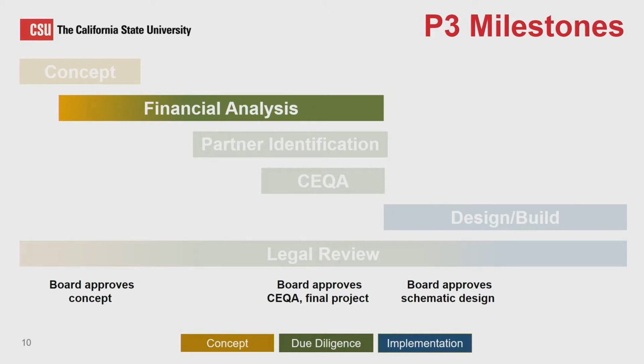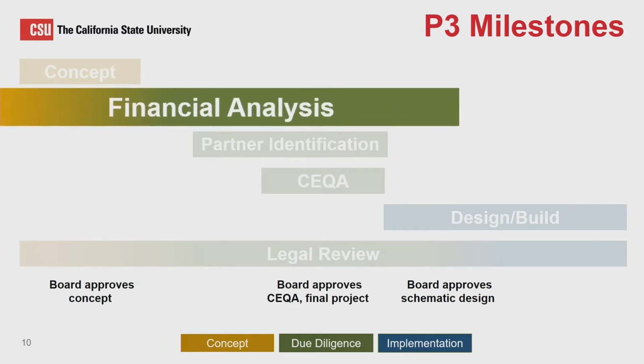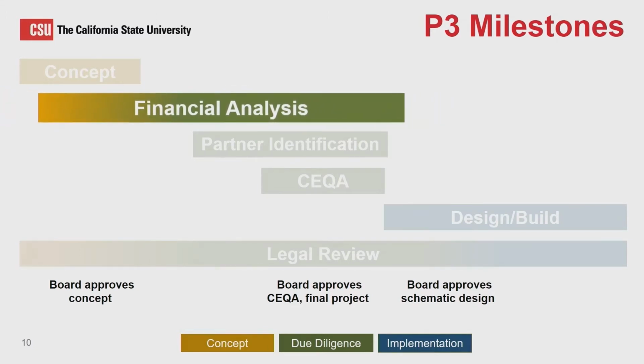And so some of the key things we'll look at: the ground lease, the ground rent structure. What's the amount of the ground rent? What's the timing of those ground rent payments? The structure, the form that they will take. Will they be a percentage of the gross revenues? Will we take some percentage of the net, maybe participate in some of the upside? If there are any what we call capital events, if there's a refinancing that pulls money out of the project, will we participate in that, and so forth.